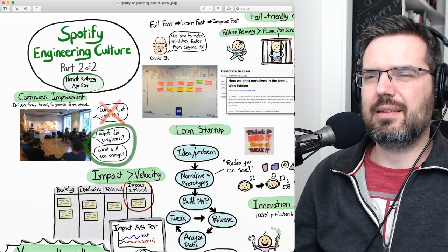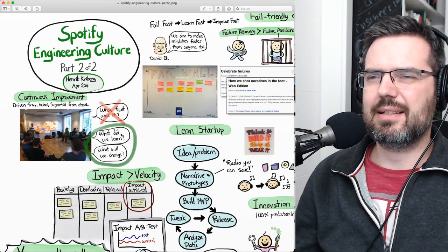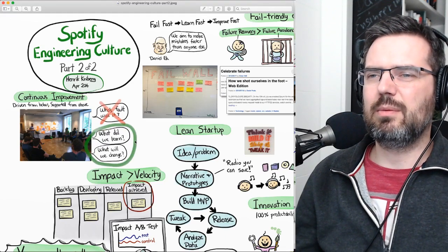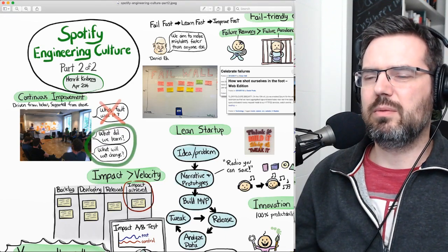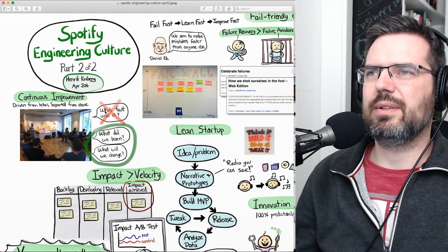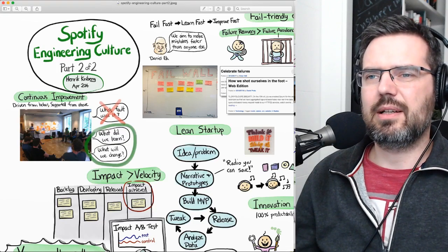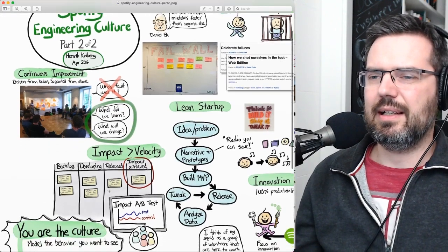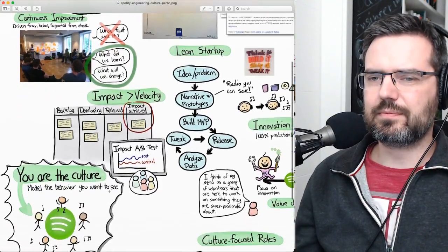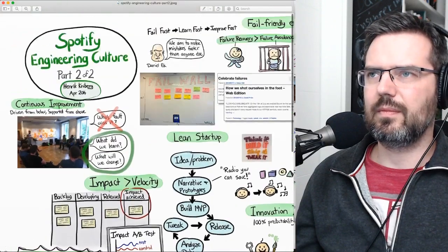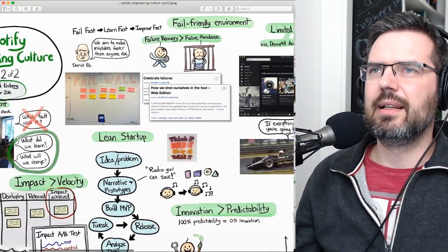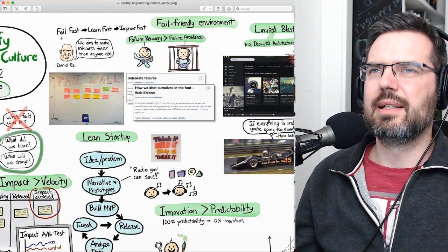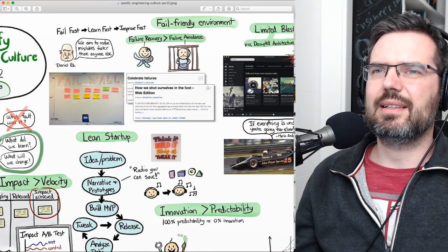So you want to go away from fault. Whose fault was it? Into what? Yeah, more or less. That is already the second step. I would say the first step is what happened. What did we learn from it? And what will we change so it will not happen again? So a continuous improvement process that you're tracking.